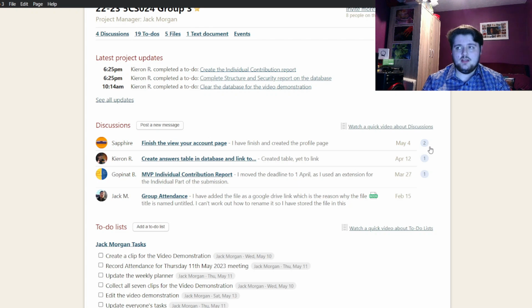Through Basecamp, as I said, I have set up each individual member's tasks that they need to complete, providing them deadlines for the tasks to be completed by, and adding extra information about their tasks that they might need. Now, for example, regarding timing, we needed to complete the website before we did the video demonstration. So I made sure the website was completed by the 9th of May, because then we can start doing the video demonstration on the 10th, and then the handing in date would be the 14th. So I had to make sure that everything was timed correctly.